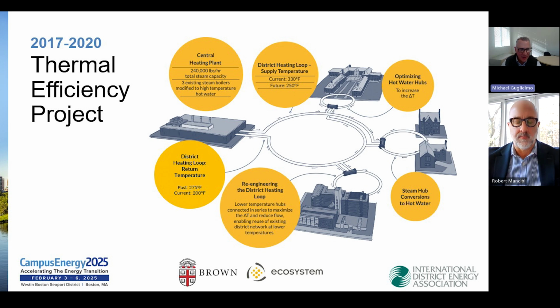Our vivarium ecosystem converted the air handlers from steam heat to a bypass system and heat recovery with hot water coils using a series of 3 short outages. This was critical for us, knowing that we have 24/7 operation. We were very concerned with impacting research. And as a result of their strategy, research was not impacted. So, great example of how this project truly engaged the campus community and had positive results.